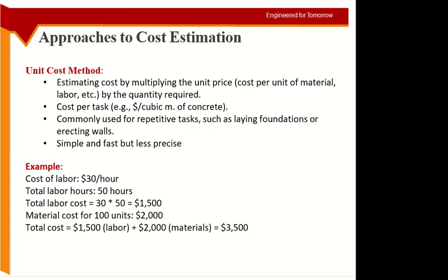Okay, and this is used for tasks which are repetitive. We have talked about this in type of contracts. So we have 20 foundations. We will not go into the detail of each and every foundation. Per foundation this much, that's it. So it's a simple and fast method.